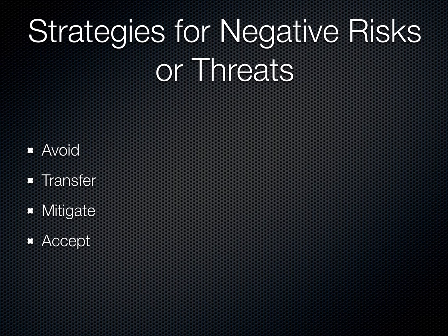Finally, to accept a risk would be to identify it and leave it passive until the risk arises. This method is only used when it is unreasonable to do any other. Precautions for this risk should be to reserve money, time, and resources, and this should be documented.